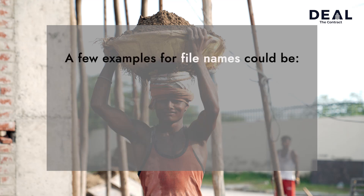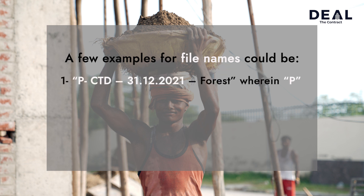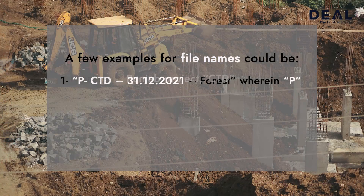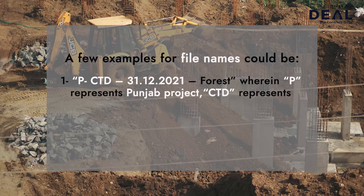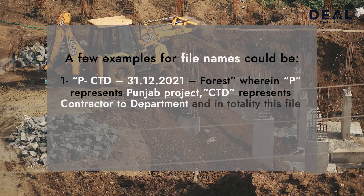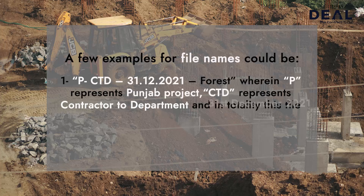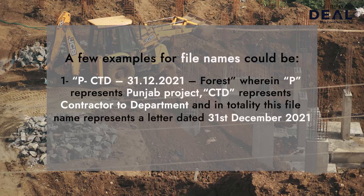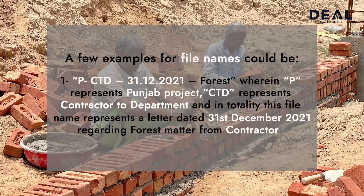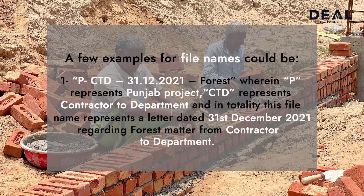A few examples for file names: First, P-CTT-31 December 2021-Forest, wherein P represents Punjab project, CTT represents contractor to department, and in totality this file name represents a letter dated 31 December 2021 regarding forest matter from a contractor to department.